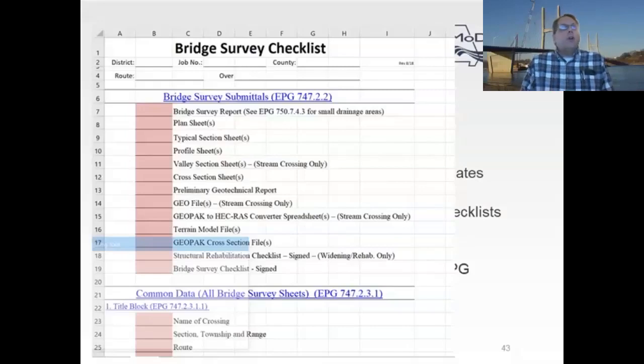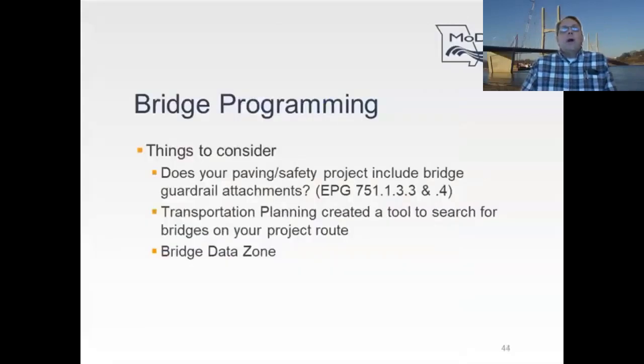If it's a grade crossing or a railroad crossing, we need some information about what are the elevations of the roadways that we're crossing, so we provide proper vertical and horizontal clearance and things like that. So that's the information that we need. We obviously like to have that before the October to December deadline so that we can use that to process the estimate.